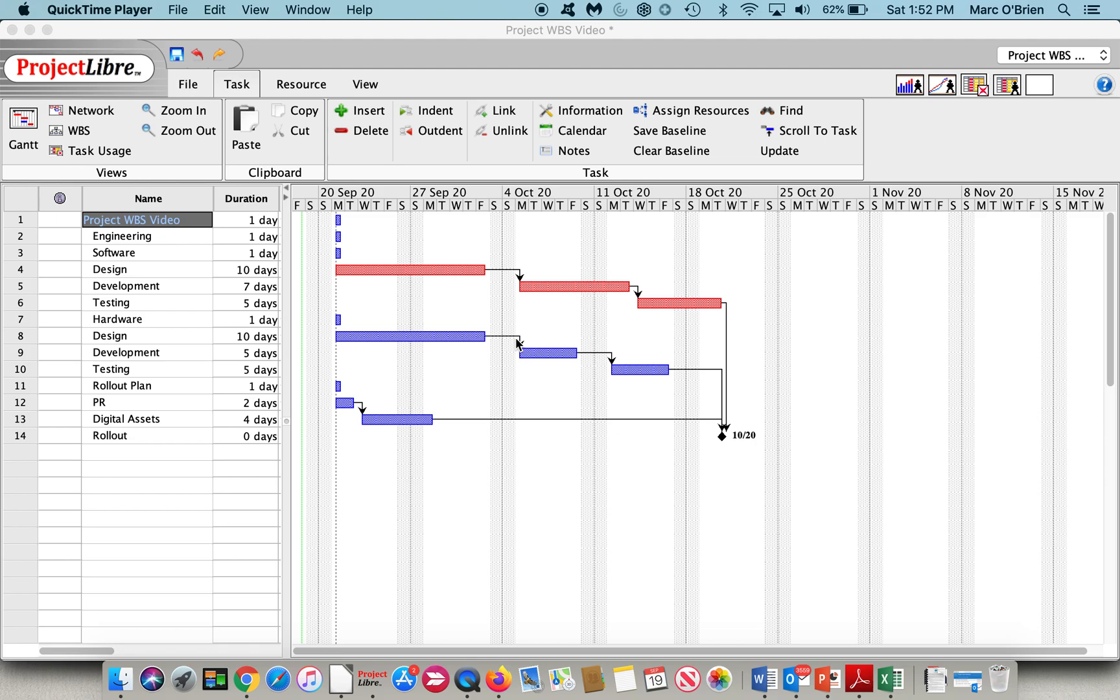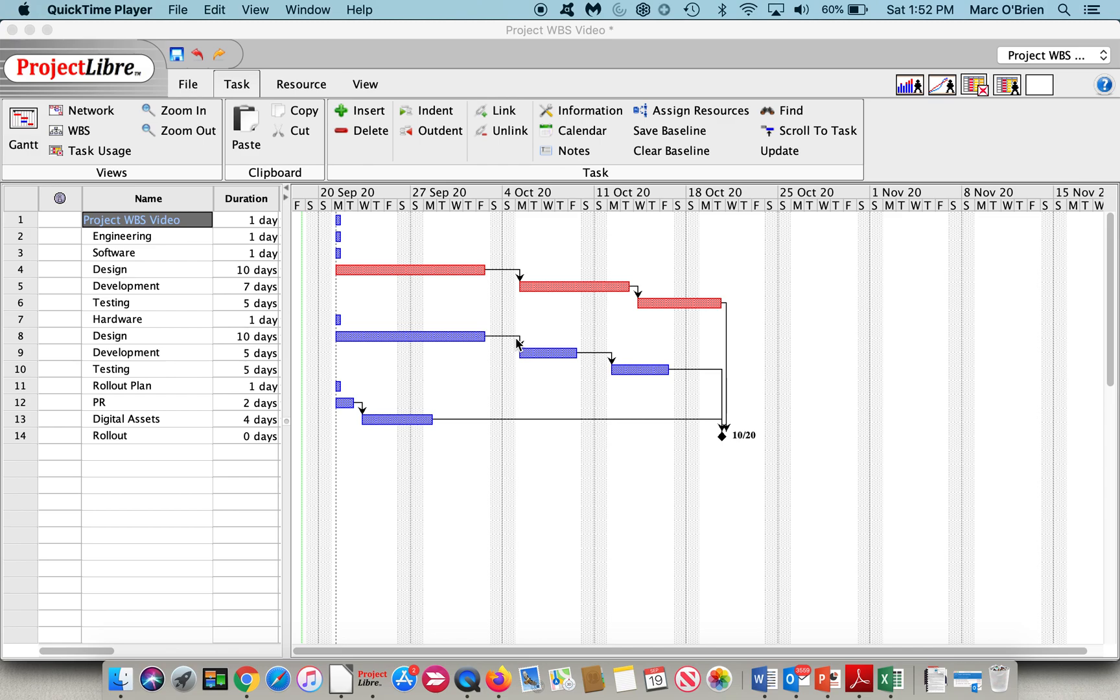This is an important checkpoint when establishing the project plan to ensure you are tracking at the appropriate detailed level. As the project progresses, the WBS framework is used to compare schedule and cost performance with the budget established for each level. The cost data rolls up the WBS tree and summarizes at each level of the structure. Cost accounts, variance, earned value can all be tracked, and it should be tracked at a measurable level based on the progress and responsibility assigned and is an effective tool for reporting purposes to stakeholders or customers at certain summary levels.